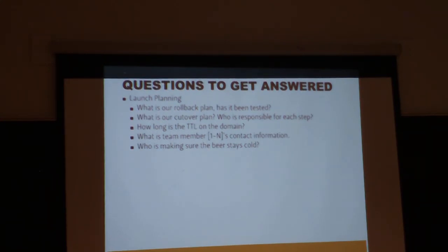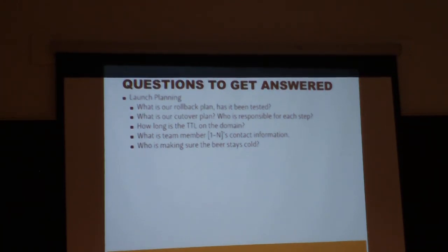Because you don't want to get to step 3 and not be able to go to step 4 because your system admin is not available, and then you have to do a rollback because one person wasn't there. It's always a great idea to have other people that can do tasks as well, but generally it's usually one person responsible for a single thing.